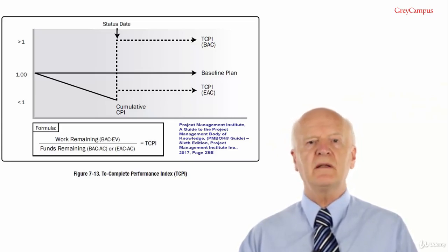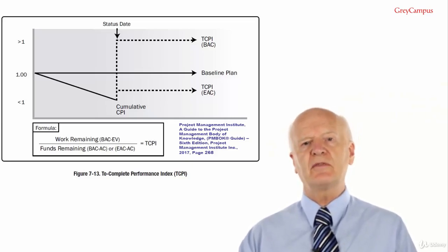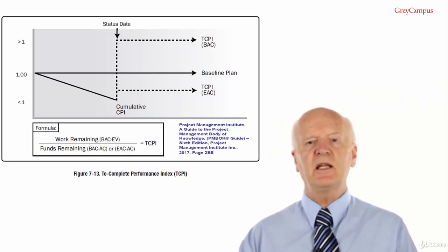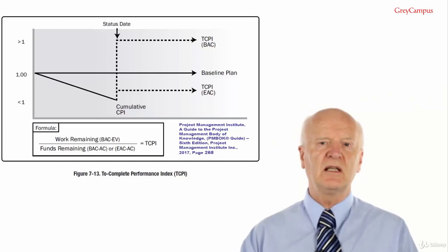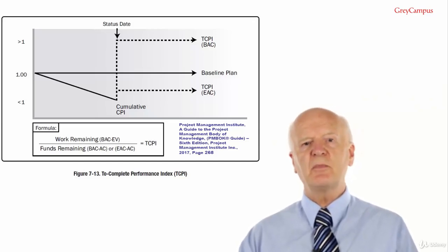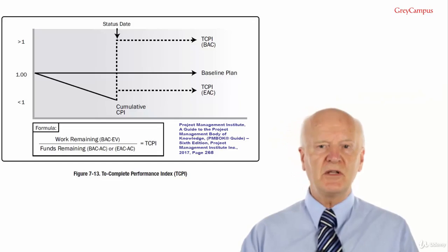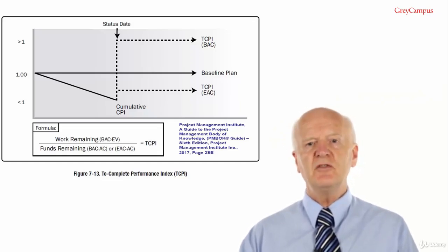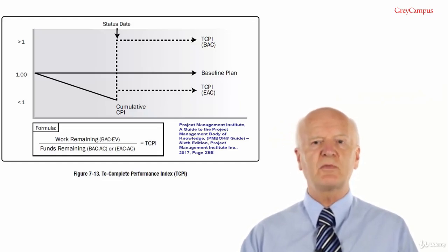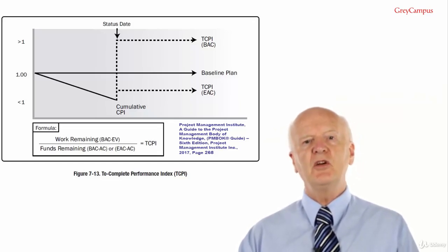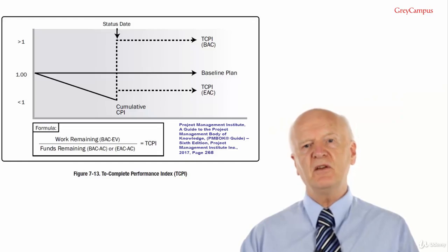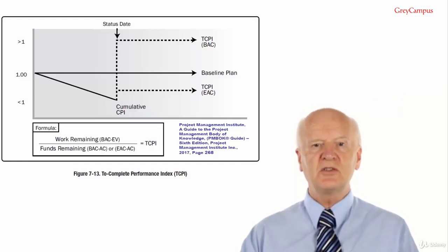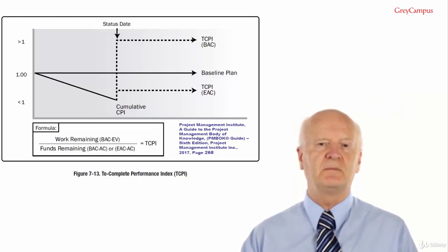At the end of day 1, you've covered just 850 kilometers, so your average speed was 85 kilometers per hour. This means that your average speed on day 2 must be at least 115 kilometers per hour to reach your original destination on time. Your day 1 speed is like your cost performance index, and your required average speed on day 2 is like your To-Complete Performance Index.